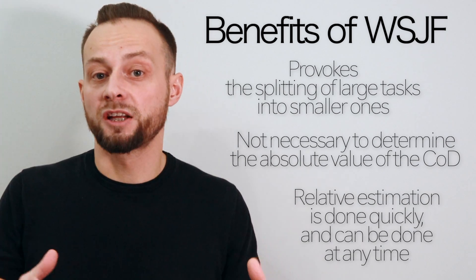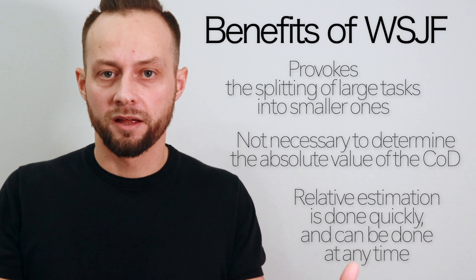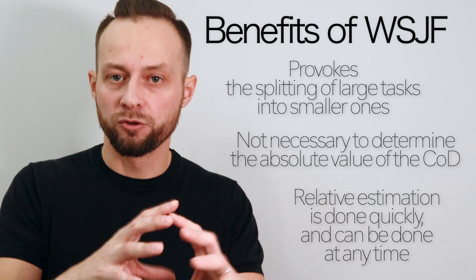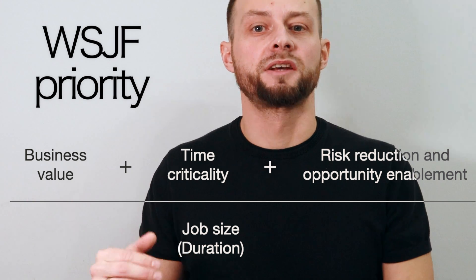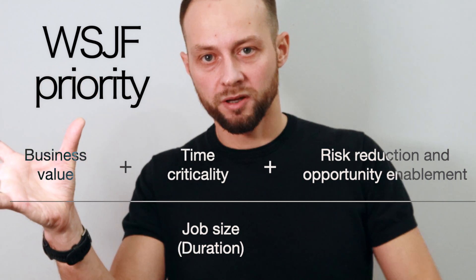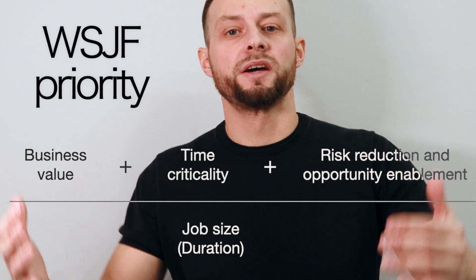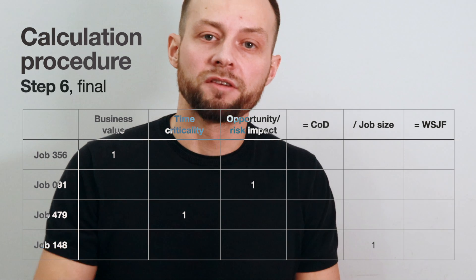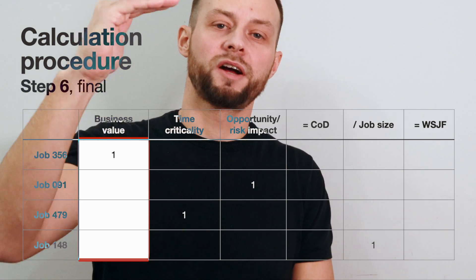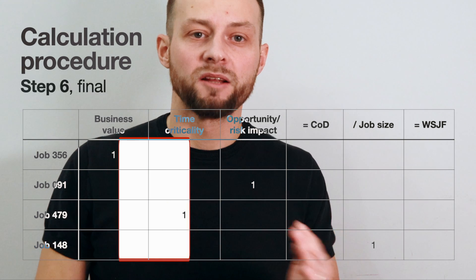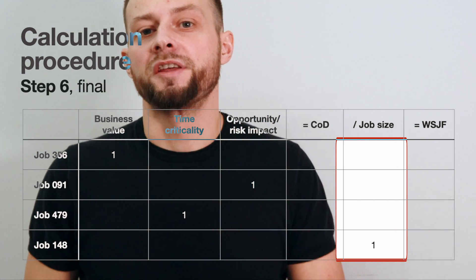Third, relative estimation is done quicker and can be done at any time — there is no need to wait for accurate estimates of each job. To summarize: WSJF priority is calculated as the sum of client and business value, time criticality, and risk reduction and opportunity enablement, divided by job size. Each of the four elements in the formula is calculated entirely for the whole list, one element after another, independently of the other elements.